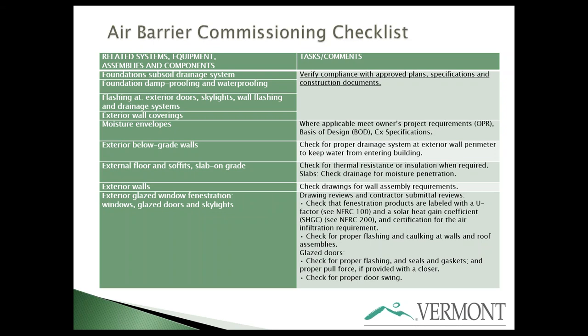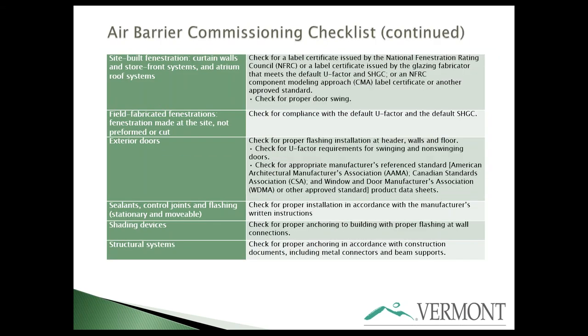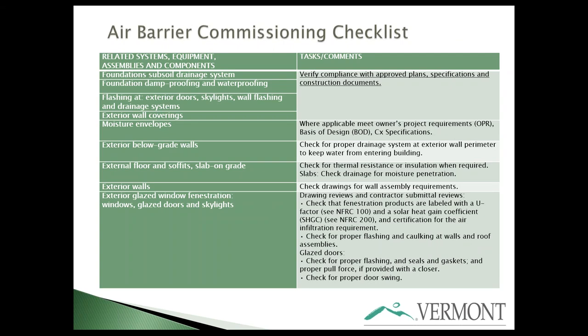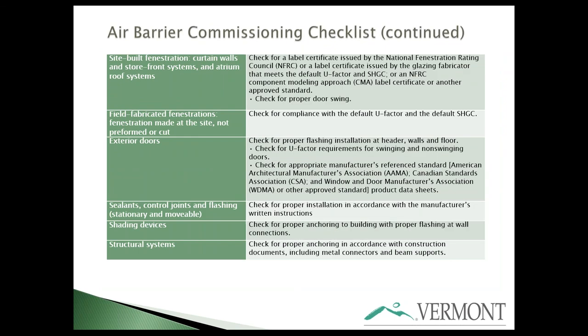The commissioning checklist is fairly long. You may want to pause the recording to read through the various requirements at your own pace. Requirements include site-built demonstrations and door requirements among others. A blower door test does have to be performed and results reported to the building owner — there is no number you must hit if commissioning was completed, but results must still be reported. All buildings will have a blower door test; some must hit a specific number, others do not if they went through commissioning.